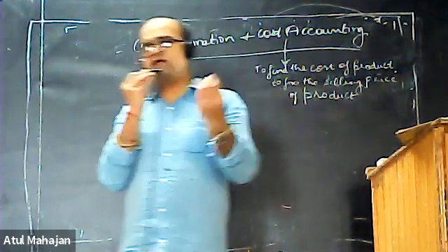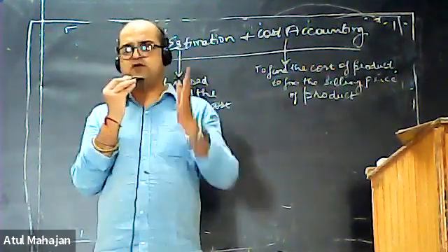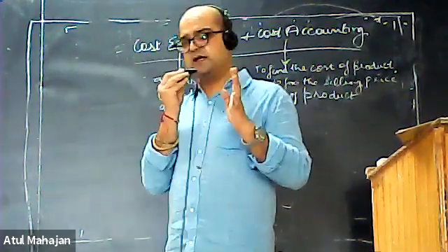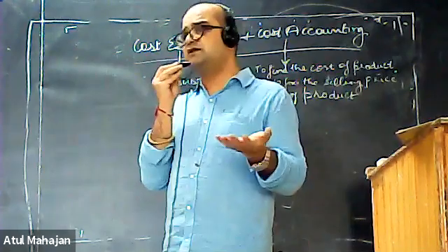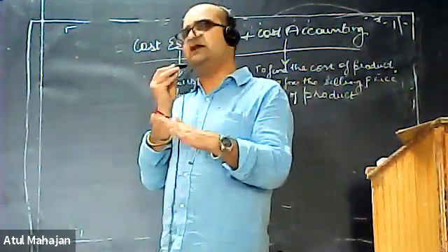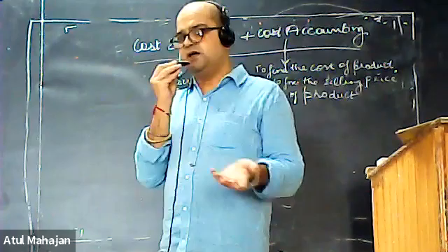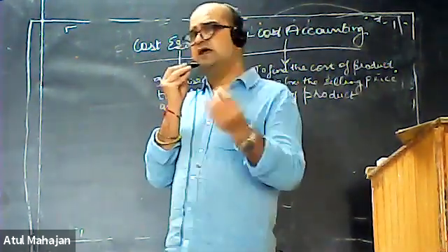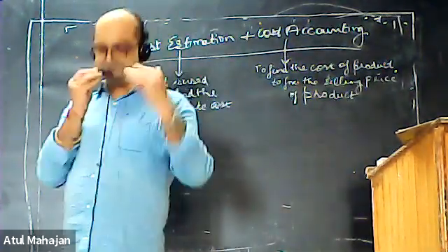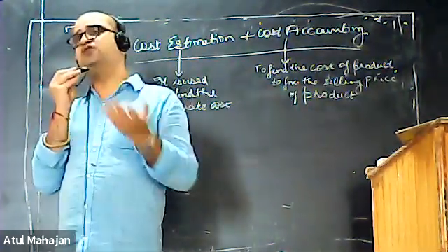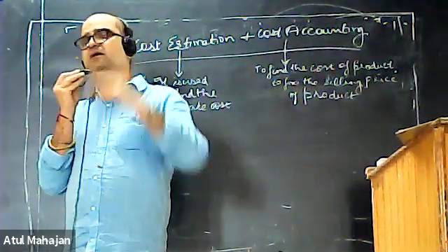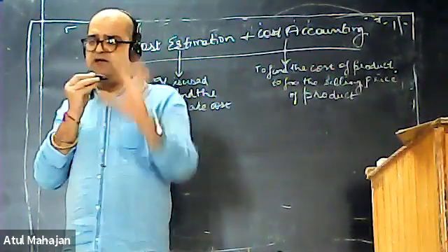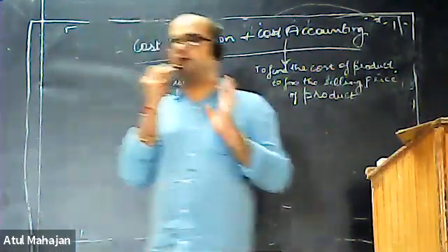So this is the cost estimation: 2 lakhs for the 100 people. What the actual cost is will be known later, once the function happens. But we need to make a budget first, that at the maximum we can get an expense of rupees 2 lakhs. It can be more than 2 lakh also, it can be less than 2 lakh also, but approximately it will be near to 2 lakh. This is the approximate price.